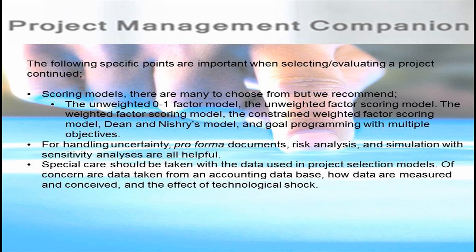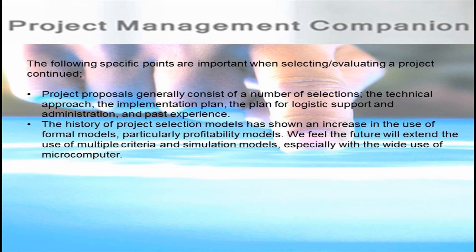Special care should be taken with the data used in project selection models. Of concern are data taken from an accounting database, how data are measured and conceived, and the effect of technological shock. Project proposals generally consist of a number of sections: the technical approach, the implementation plan, the plant or logistics support and administration, and past experience.